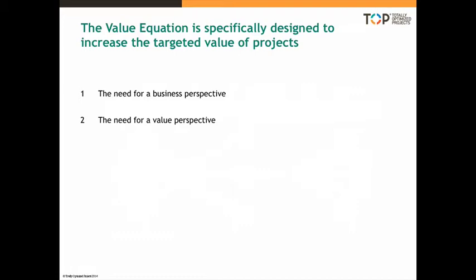The value equation is value-based and uses the desired business outcome statements that we were just talking about as the source of benefits identification. And it requires that you start by identifying all of the available benefits made possible by the delivery of each desired business outcome in turn. So only after you've identified all of the benefits do you then identify and compute the costs of delivery.